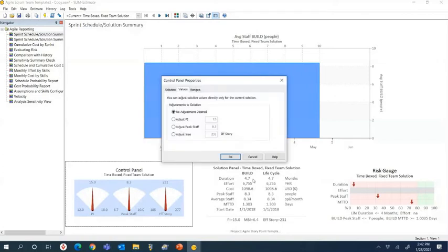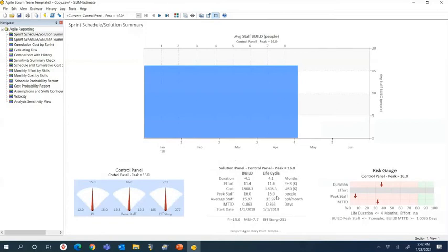What if we, let's say 4.5 months isn't good enough. We need to get done in 4 months. Well, what are we going to do about it? Well, what if we can use that extra Scrum team? What if they can help us out? Within seconds, I can see a whole new estimate with a bigger team size. You can see the people go up. You can see here that we save a little bit of time, but at a bigger cost, right?